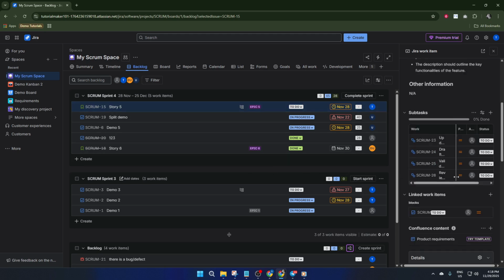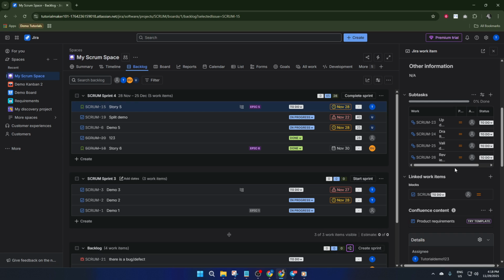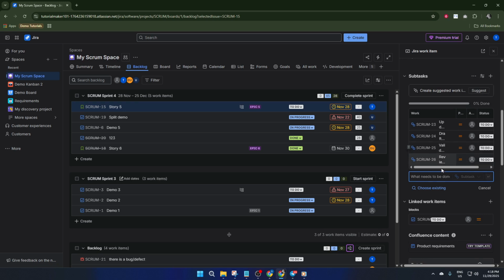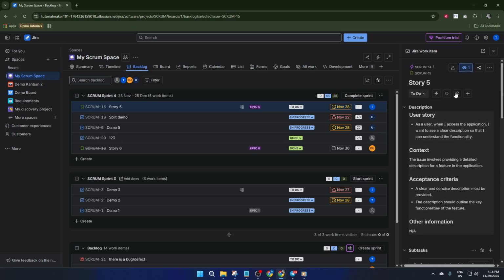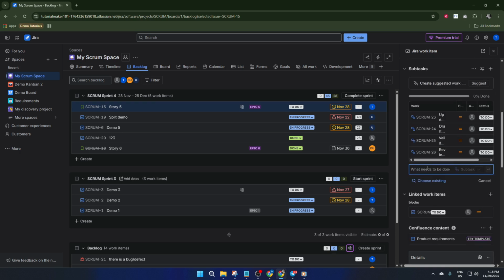Now, as to how to use subtasks in Jira. A subtask should always be linked to a parent issue, be it a story, a task, or a bug. They cannot exist independently, just like toppings need a pizza base, right? Unlike toppings, though, they aren't visible in the backlog and shouldn't be planned independently of their parent issue.